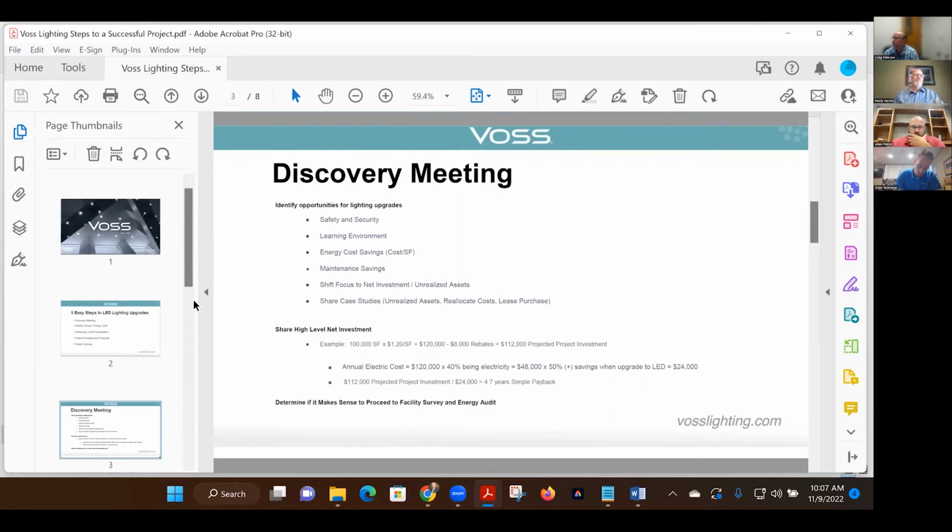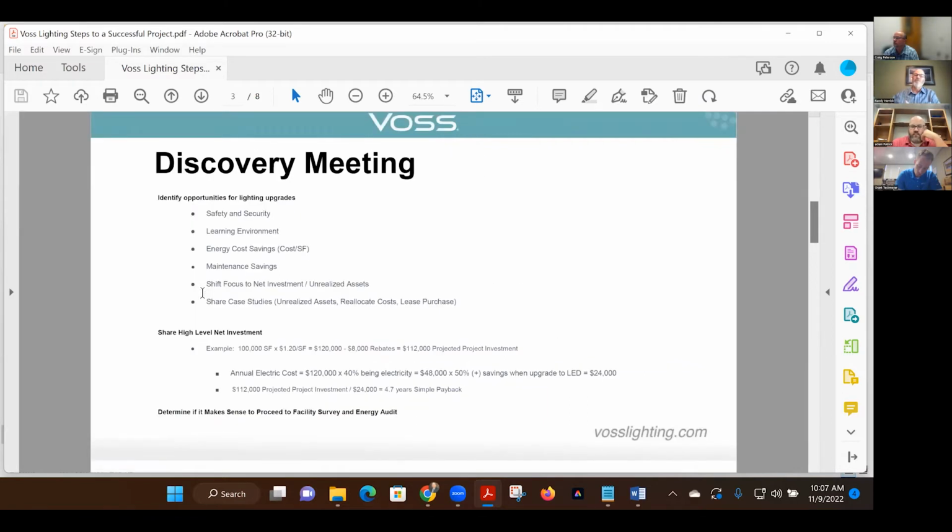We said, okay, we're seeing projects come in at $1.10 to $1.50 a square foot. And that variation comes down to the scope of work. Is it going to be just lamp replacements, or full fixture replacements? Is there a gym included or not? So anyway, for that example, we said, okay, it's 55,000 square feet at $1.10. That was 59,000 and some odd dollars, which would be the project cost.